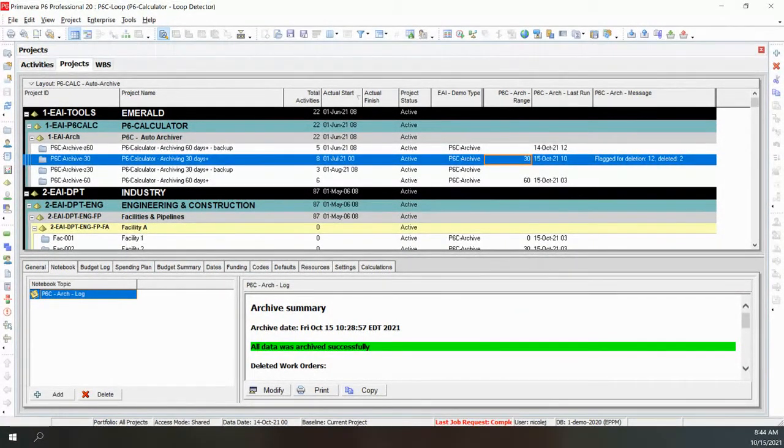I missed it. Can we retrieve the archived activities WBS back in the schedule if needed? No. That's why we give you a grace period. Once we delete, I say no if you're doing the archiving that deletes them. If you're doing the archiving that pushes the project to another database, then yes, you would be able to get them back. That's why most of our clients chose not to delete them outright.